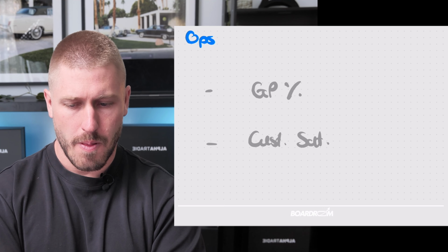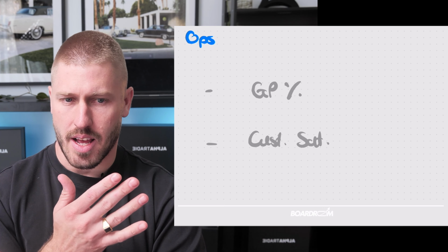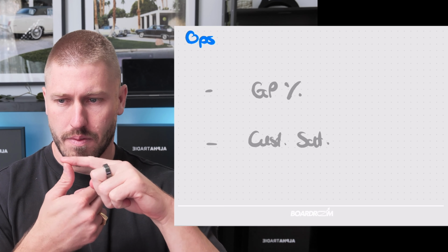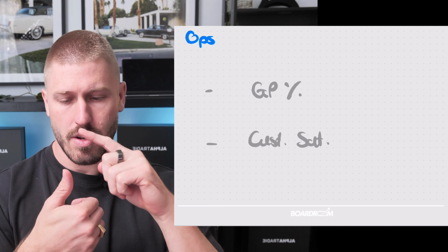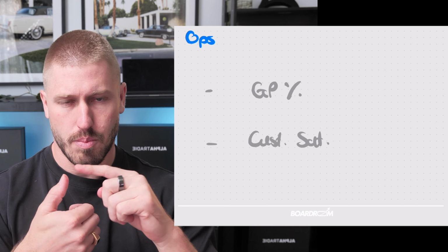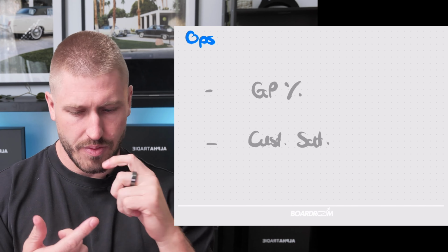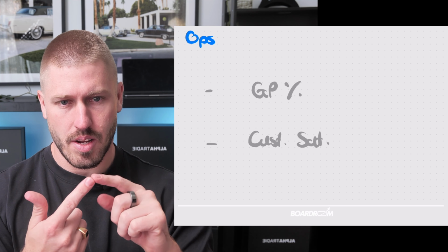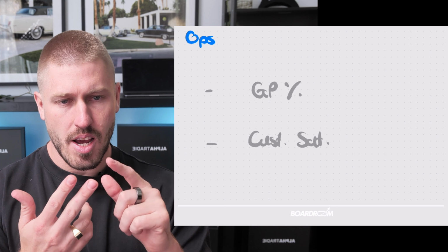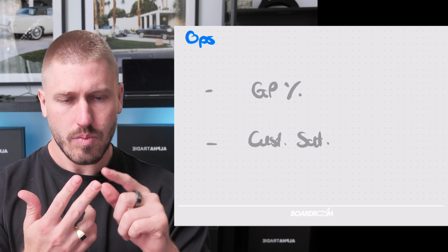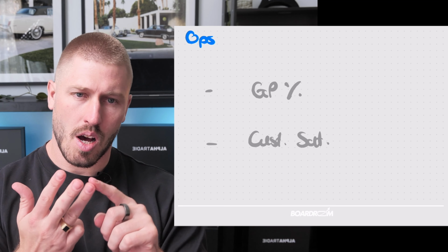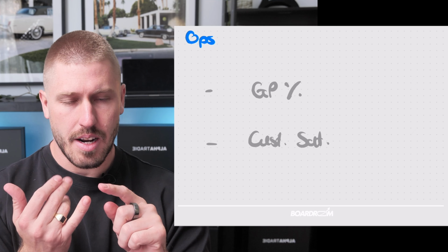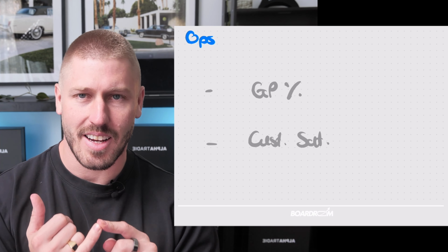How did the project go? And there's 4 or 5 measures that we are testing their response. So if their response is, yep, absolutely fantastic, and there's no ifs or buts about it, they get scored 100%. The project manager notes that down. If they speak to the client and it was great, but, and there's only one component, that's 75%. If it was, yeah, okay, it was this and that and this, they get 50%. If it was a whole range of different defects, they get 25%. And if they are too scared to call the client back, they get a 0%.